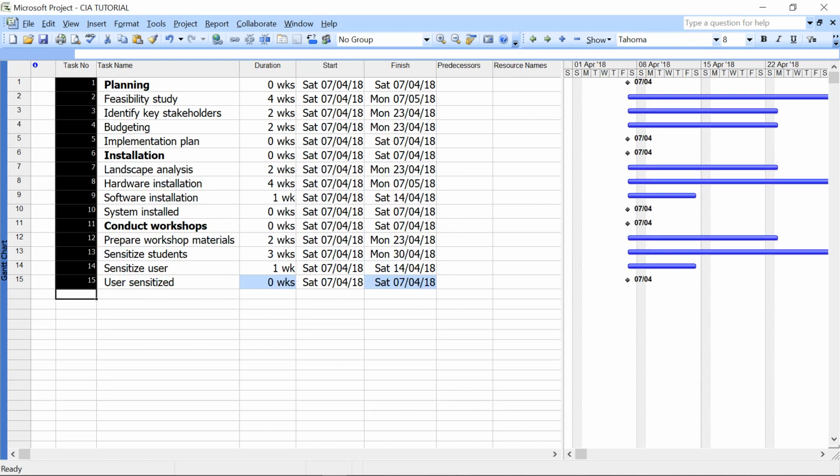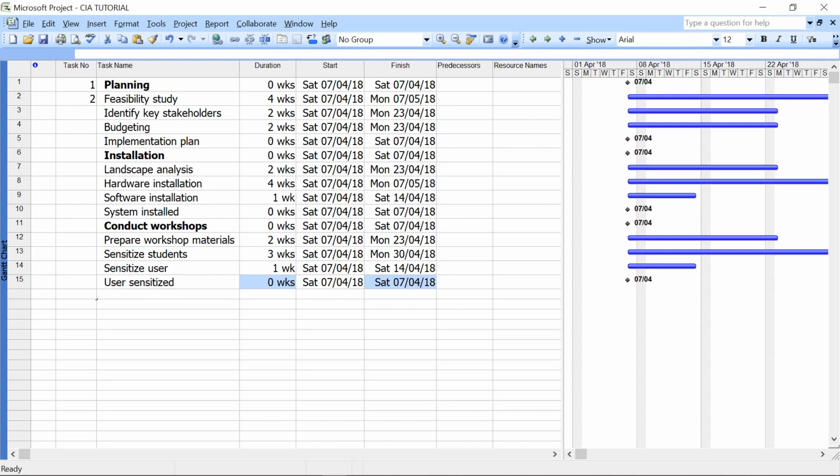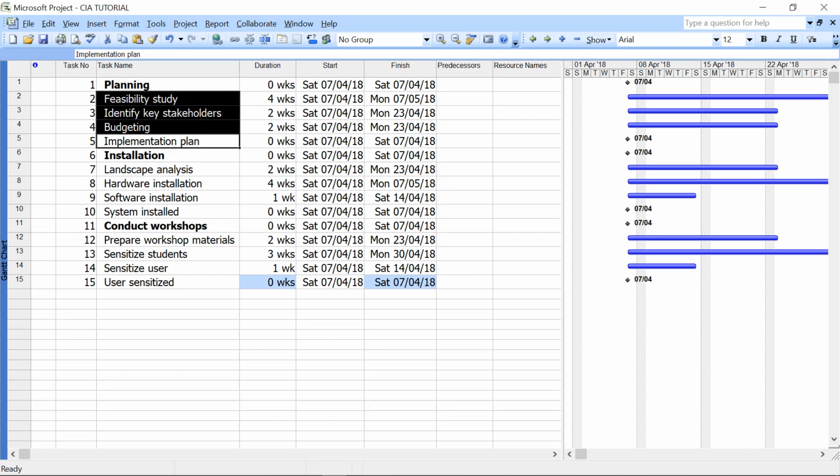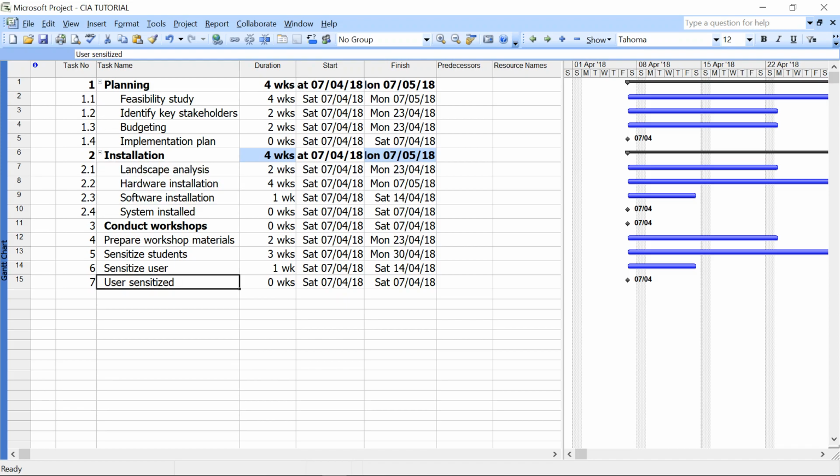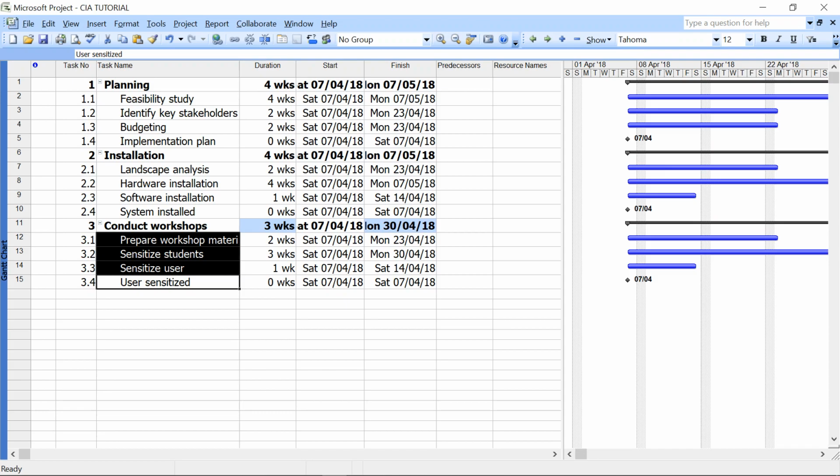Okay, bigger font, bigger appearance. So now indenting, you highlight this from 2 to 5 and then indent using this arrow. Then you do the same here, you indent. Now when you indent, you see it's going to calculate.